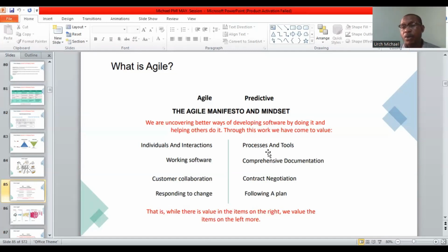After the proper evaluation, it's going to go to the change control board, and it's going to tell them that there's a change coming up from someone. He's going to tell them that he has done an evaluation, that this is the impact, and for this reason we're going to be paying an extra 10% on the initial contract sum. And they're going to look at it and say, okay, we might not be able to approve this change because we don't have the money to do that.